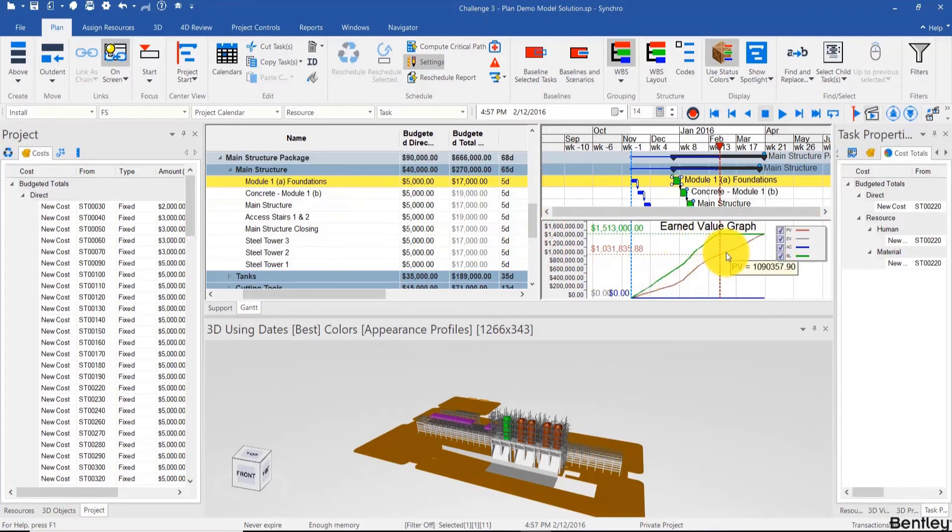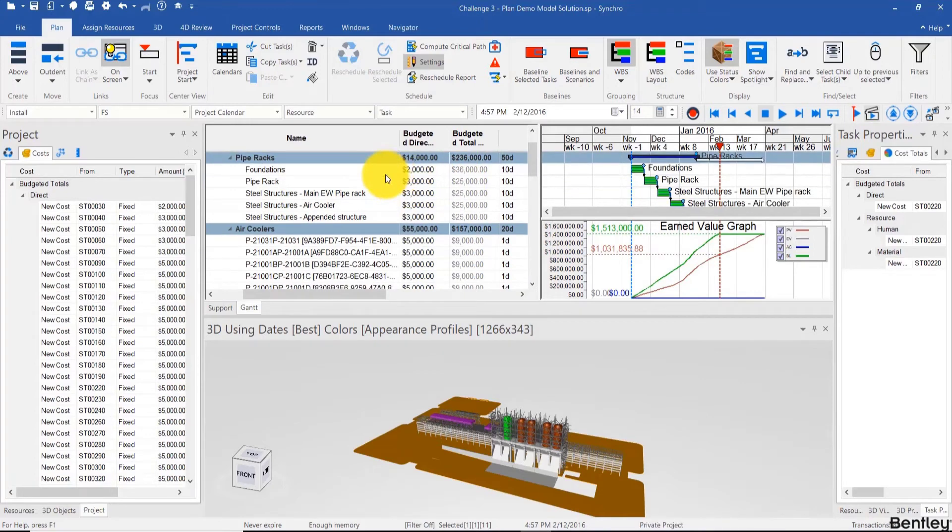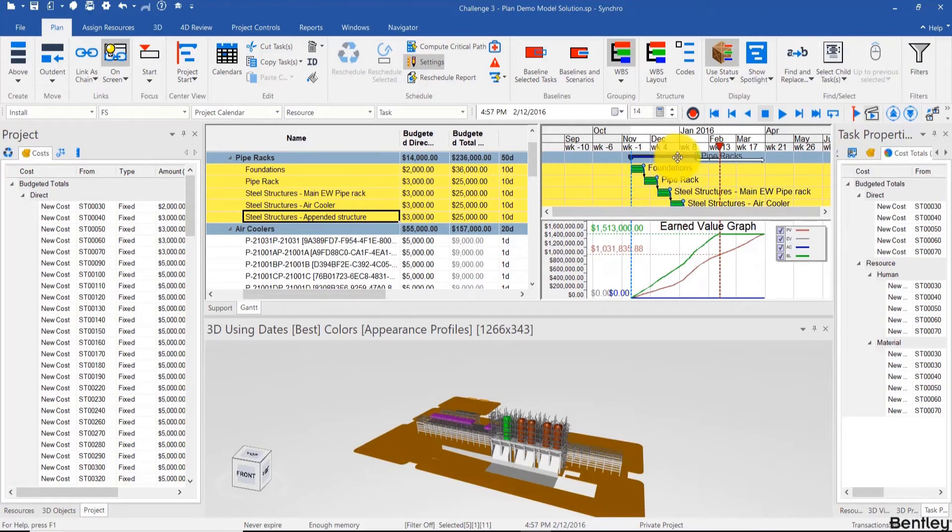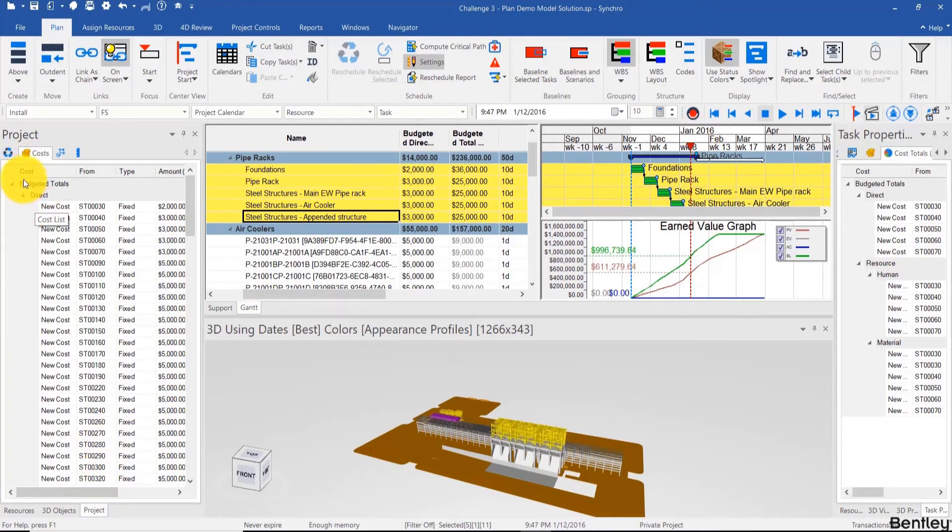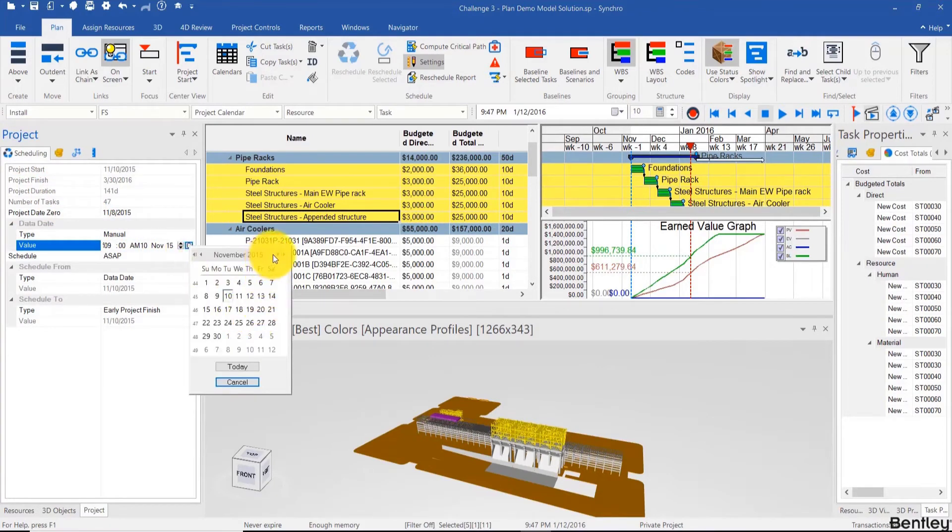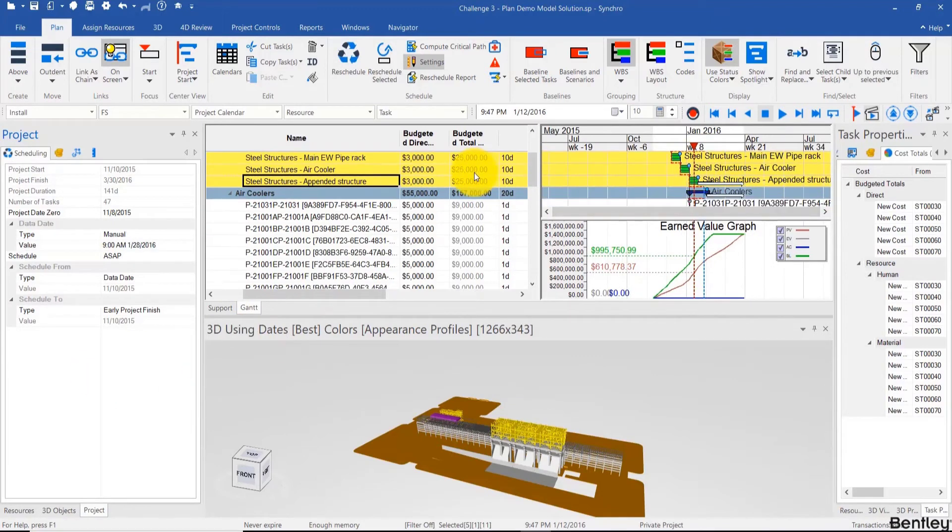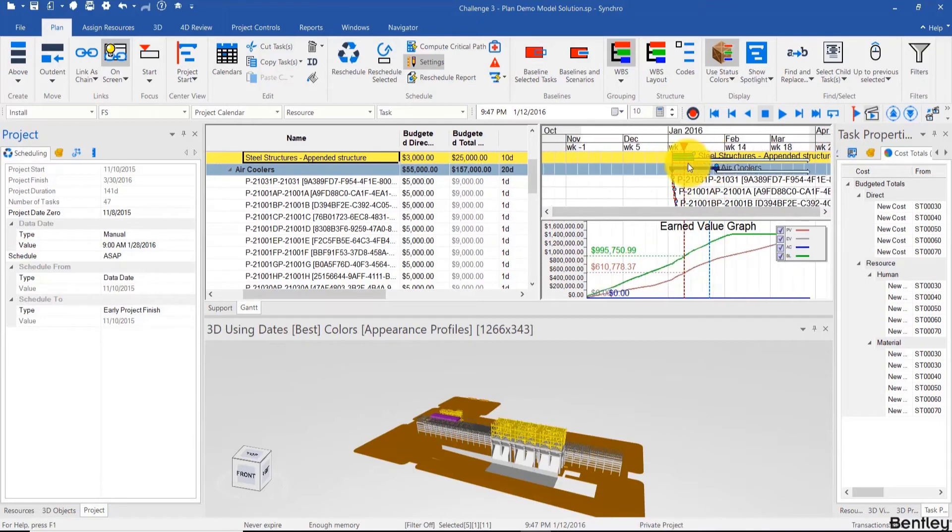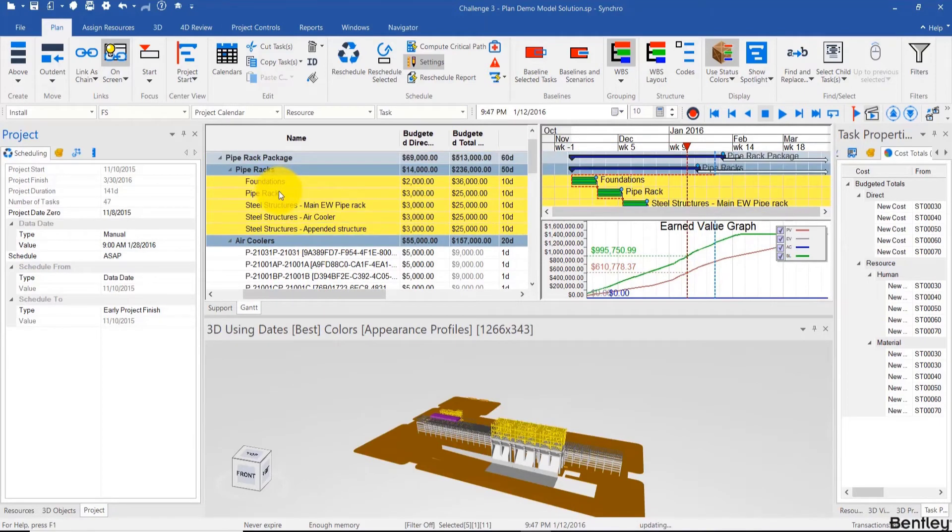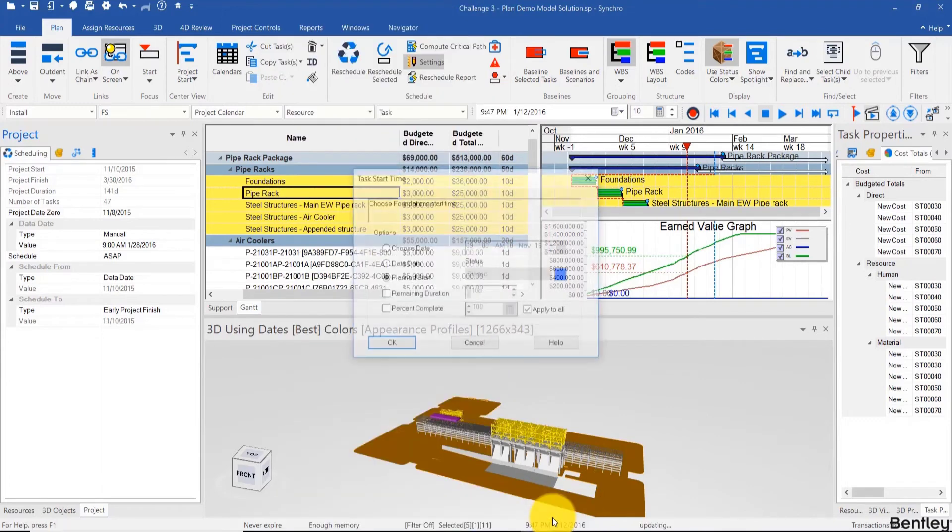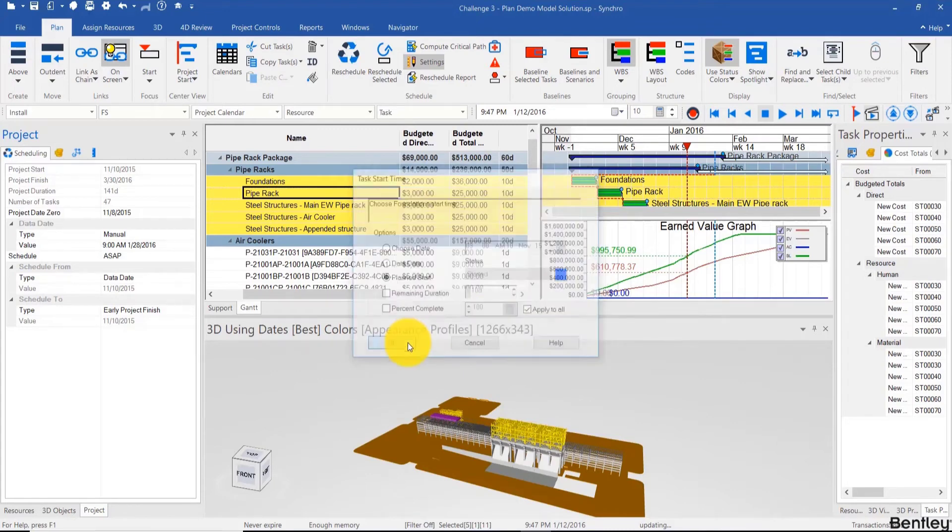Now let's actualize some activities. If I mark these as completed, for example, I usually don't like to do that if you don't move the data date because that doesn't make any sense. So I'll start by moving the data date a bit, so I'll go here. Let's move it by two months, for example. And now the blue line is over here, which means that it makes sense for us to status any task that occurred before that. So I'll select those and progress them and finish those tasks.